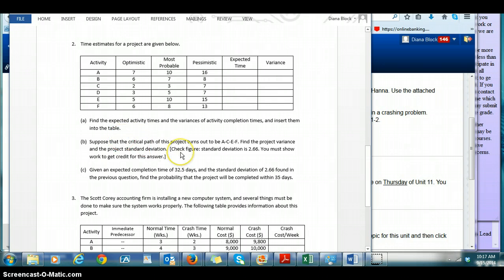And so in part B, it tells you what the critical path is for this project. So now that you have this critical path information, it asks you to find the project variance and the project standard deviation. So you're going to use those items on the critical path to determine the variance and standard deviation for the project.